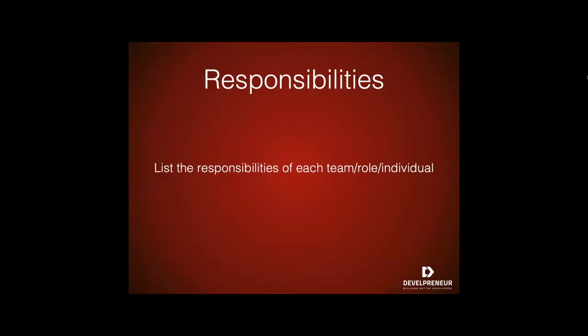If you don't identify this before you begin testing, once you get into the test plan, you could have a situation where, oh, I didn't know to test that. I thought so-and-so was going to test that. Or that particular test role is outside of my scope, so I didn't test that because that's not what I do. So you need to identify these responsibilities first so you don't get into a situation where people either don't test or certain test roles may fall through the gaps because people don't think it's their job.